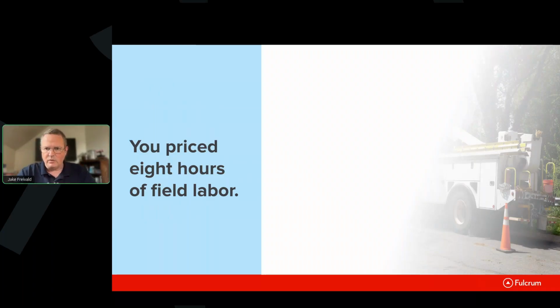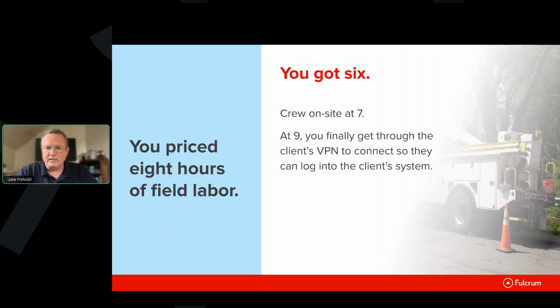This is a real scenario given to me by a customer where they priced out 8 hours worth of field labor over the course of multiple weeks for a given project. When he priced it out, he actually got about 6 hours of field labor in that day. One of the reasons is that the crew, although they were on site by 7 and were being paid for starting at 7 o'clock, were struggling to get through the client's VPN to connect into the client's systems.